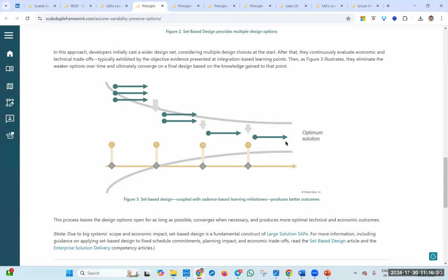Now we got the difference between spike and enabler. Yes. Spike is for experimentation. We want to implement, but we don't know how to implement, so we will do a spike. Enabler is like, we know this is what we have to implement. So that's the reason we say that any new team member joining your team, you might be doing some setup. That is an enabler.